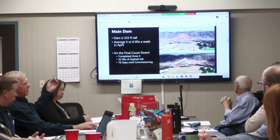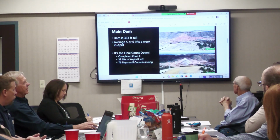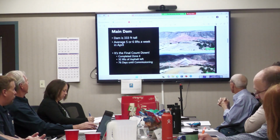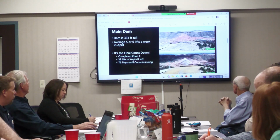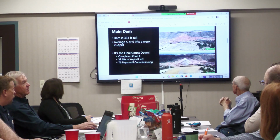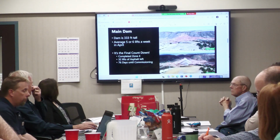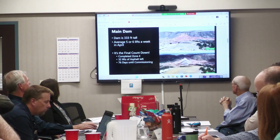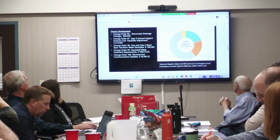This is a couple weeks, 3 weeks old. At that time it was 333 feet tall of the 350 feet, with 5 to 6 lifts a week. So at the start of this month, there were only 32 lifts left to complete the dam. So that's really getting close. We've got just about a month and a half now before we commission the project.